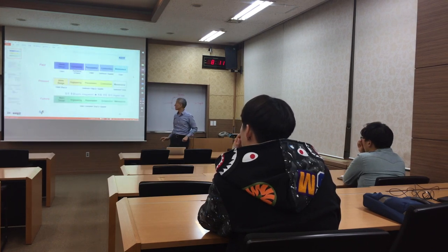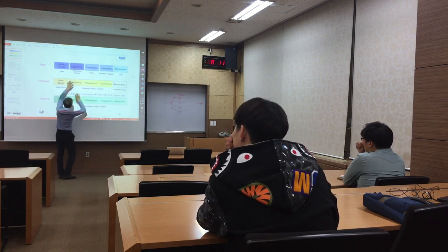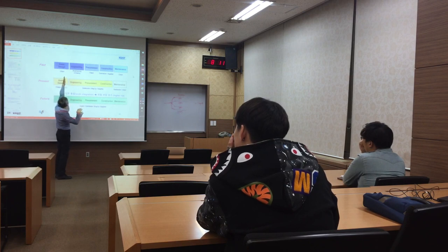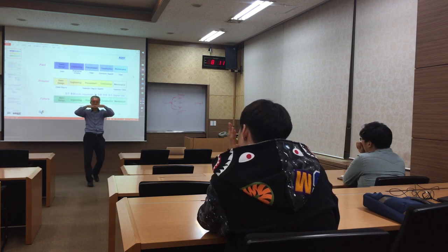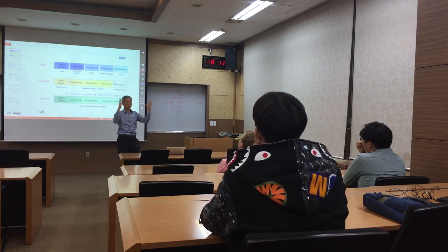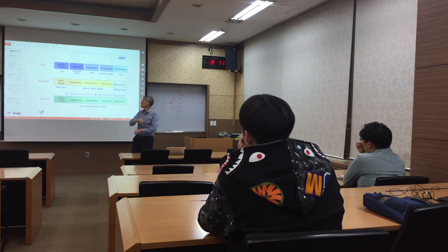This slide shows that the time schedule can be reduced by engineering coming earlier than the end of the schedule. Procurement overlaps with it. That is the idea of concurrent engineering. To reduce time, you should overlap activities.